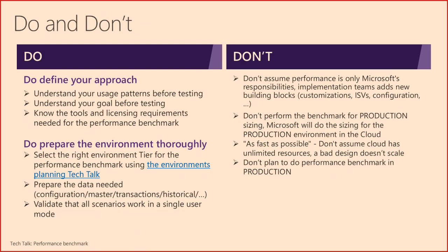The final point is the most important. You cannot use the production environment to do performance benchmark or any performance testing. It will need to be done on a tier 2, 3, 4, 5, but on a non-production environment. In production, what you will be able to do is a final validation of your processes, following the go-live preparation. And that's it.